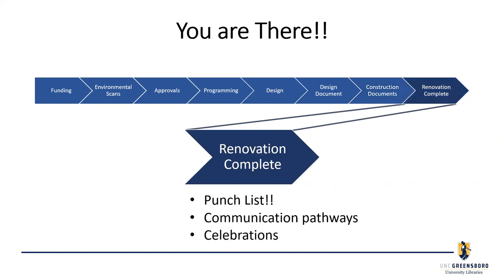Once you finish the renovation, there's always a punch list. On a project this size, it's probably going to be another year before all the little nooks and crannies are completed. It's important to know that upfront — when we say we're done, we're really not done. There's also a celebration component, and communication about changes people aren't used to. The celebration is going to be a big deal because it's going to be a lot of work to get there.